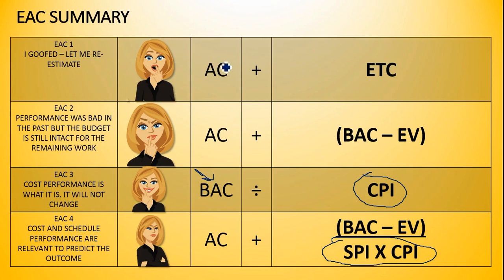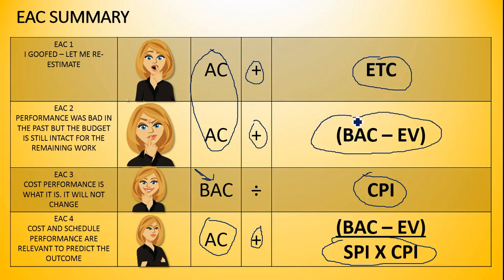Again, take a look. Except for one, they all start with AC. They all, except for one, have that plus. And what are they adding in three out of the four? They're adding the estimate to complete. But the estimate to complete is reflected in different ways. In this second one, this is the estimate to complete. If we know our budget and the work done, we can find the ETC if the budget is still intact. And in cases where we want to factor in the cumulative SPI and CPI, then we just use that as the denominator. All right? So I hope that helps.